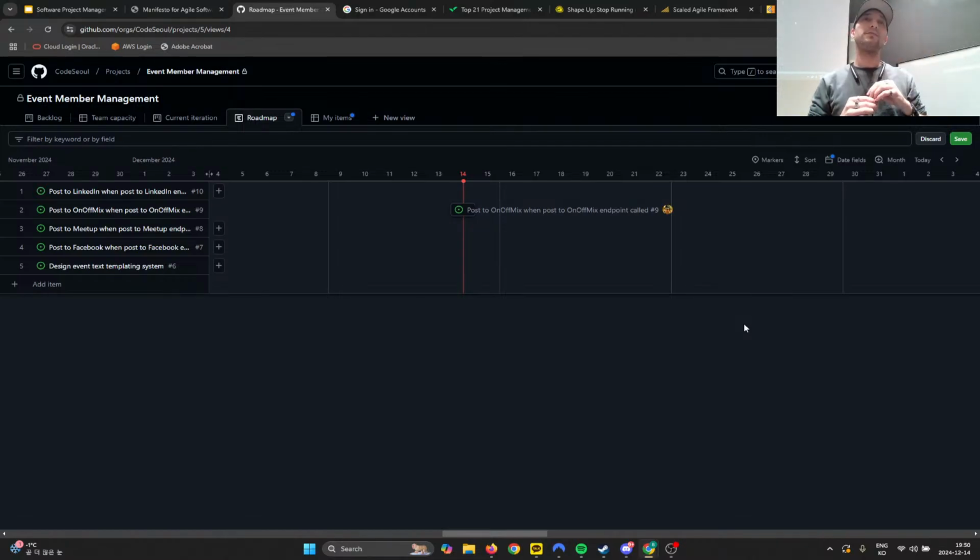Most of the time what we used to do was set up a task of like 3 days. You talk to the person: what are you working on, what's my timeline, how many days can you do this? And you talk it over. Then the person says, okay, 2 days, and you say, okay, do it in 3 days. And then he briefs you every day, takes you through what he has done, how far he's gone, and what his implementation approach will be. That's why we use the deadline thing. Yeah, that makes sense. Because something we implemented later on, this is just a particular company that I worked with.